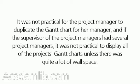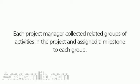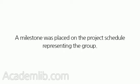If the supervisor of the project managers had several project managers, it was not practical to display all of the project's Gantt charts unless there was quite a lot of wall space. The milestone chart was devised to save space on the project manager's supervisor's walls. Each project manager collected related groups of activities in the project and assigned a milestone to each group. A milestone was placed on the project schedule representing the group.